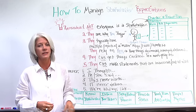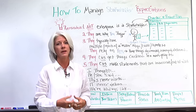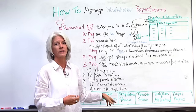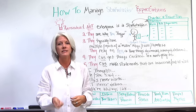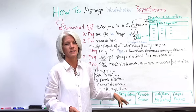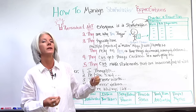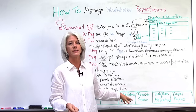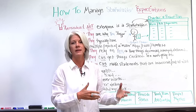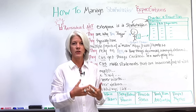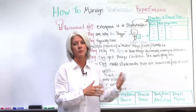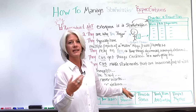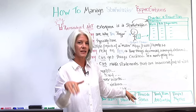Get your team to know your stakeholders. Team members need to know not just the tasks they're responsible for, but who they're working for, who the client is, who the stakeholders are, and things about the project that are important. Then set up and enforce a process. As a project manager, keep processes in line so when other people in the organization approach you or your team members, let them know there's a change management process. If feedback needs to come through the project or decisions need to be made, it needs to go through the formal change management process — and sometimes you have to tweak your process to keep it up to date.